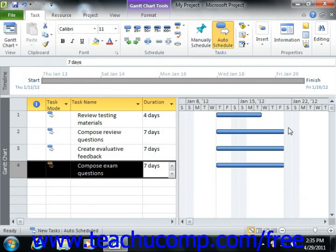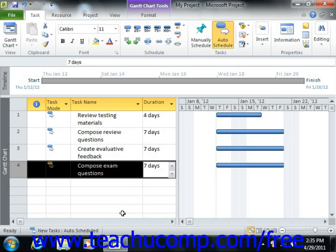Also note that Duration can be entered in several ways using the following abbreviations if desired: M for minutes, H for hours, D for days, W for weeks, and MO for months.